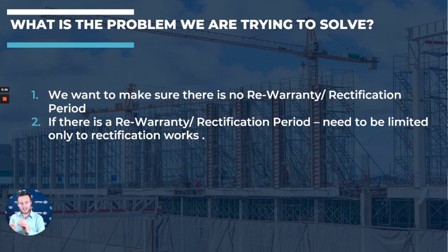The original defects liability applies to everything else. So once that's up, that's done and dusted, and we're only waiting on this particular thing for the additional stuff. I hope that makes sense. Why it's important to the client is they don't want to be waiting forever to get the rest of their security back, because it's cash flow. That makes a big difference to their business.